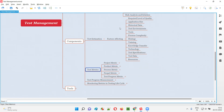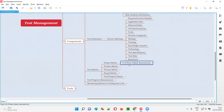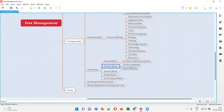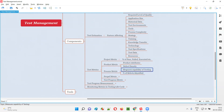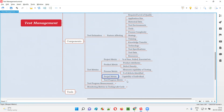As part of managing testing activities, we have to measure project metrics — like how much percentage of the application has passed testing, how much has failed, how much has not been tested. Then product metrics — what are the different attributes of the product, how many defects are coming in, and defect density across application functionalities. Process metrics — measuring the capability of testing, how well we are doing testing, measured by the number of defects identified by the testing team. And people metrics — how capable the individual testers working in the team are in identifying defects.